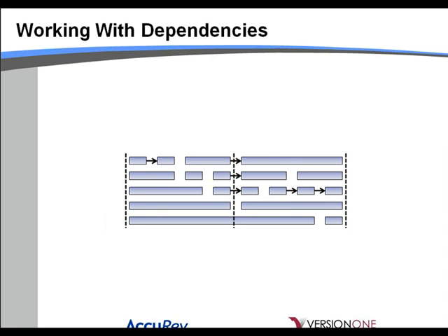But I've still got that one thing that doesn't fit. Now what can I do? Now, it's not the case that I'm going to show you all the techniques for breaking this up. You may still run into problems. And one technique that I actually don't have here on the slides is you can do parallel iterations, where the big stuff is in one branch, if you will, and all the little stuff is in another one. That's one technique. Generally, it's not used for very long.